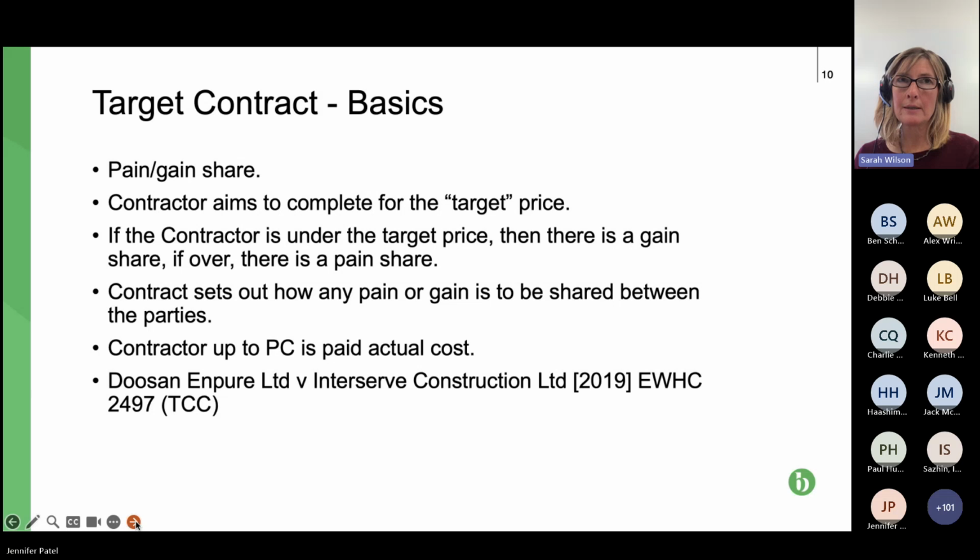My suspicion is that in most instances, that final one is probably just a slight change, unless there've been adjudications to determine the valuation of compensation events through that defects period, in which case there might be a greater assessment to do following those adjudications determining the compensation events. So that's how it works under NEC.